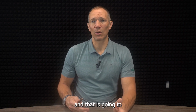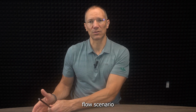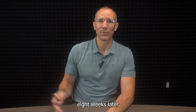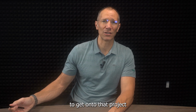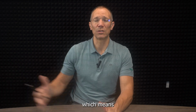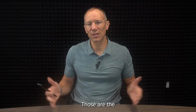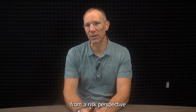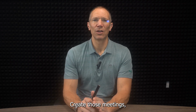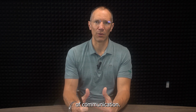And that is going to help you from a cash flow perspective avoid what otherwise would have been a tough cash flow scenario. Because if you order it now and you're expecting it to be billed 8 weeks later, and all of a sudden you're not able to get onto that project or that second story for 8 weeks, that means you're going to be invoicing that money even later, which means you're going to have to hold over the cost of that material or any other supplies and equipment. Those are the kinds of things that your project manager can help you with from a risk perspective to your cash flow. Information flow. Create those meetings, create those people in a structure that allow for that constant flow of communication.